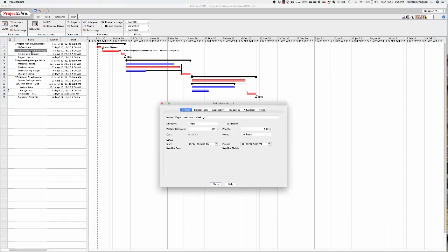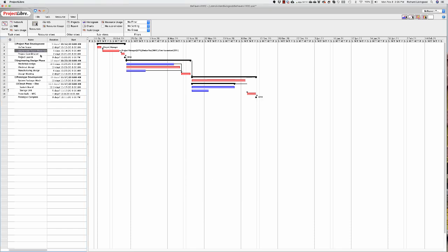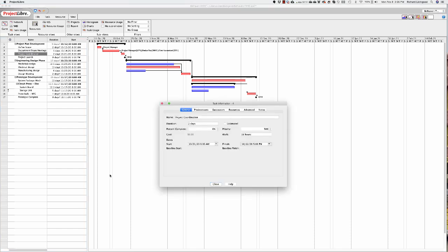The design team, and this is where you can start to look at things like, wow, $7,100. Well, you've got the project manager working a quarter of his time or her time. You have the cost accountant working a quarter of his or her time. Then you have 3 design engineers working 5 days in their design or department team meetings to develop their plan of action. Okay, and then when all's said and done, they come back together again, and we haven't assigned anything to that yet.